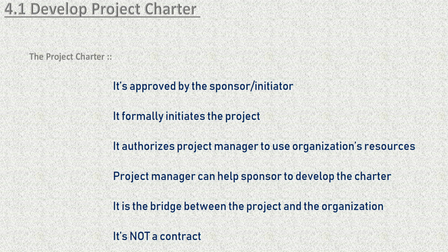Final approval for a project charter is done either by the sponsor or the initiator of the project. Please remember this: the initiator and the sponsor may be two different entities. Suppose the project is initiated from one of the departments in the organization, but the project is sponsored by another manager in a different department of the organization. That's quite possible.